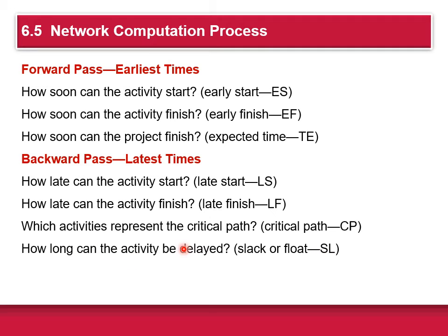This slack or float provides flexibility in the project schedule, because if your project has a slack or float amount of time, project managers can use that to shift activities and resources to meet the project objectives and priorities. Quite simply, this is the amount of time an activity can be delayed without impacting other activities or the project end dates, and it changes over the course of the project implementation.